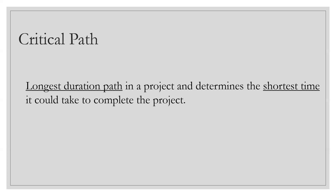So the longest path is the longest duration-wise, and time-wise there is no buffer on it — and that is why it is called the critical path. Now you understand why things are called high-priority when they fall on the critical path: because there is no late start, no float, no buffer. If you delay a critical task even by half a day, you are going to hit day one. That is why it is called a critical path component, requiring focused, high-intensity attention.